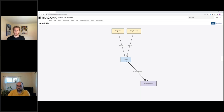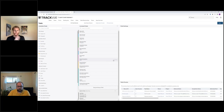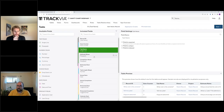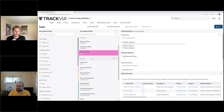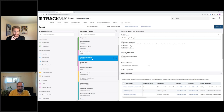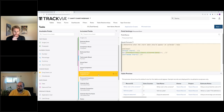Inside the tasks table, I've given each task a name, some notes fields, an estimated start date, and an estimated number of days in length — so you can adjust on the fly if the estimate changes from seven days to ten. There's also an actual start and actual completion so users can come back later and compare what was estimated versus what actually happened.